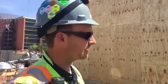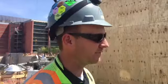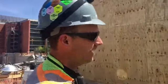And as long as it's bid into the project and we've talked to the rebar suppliers, it's an okay thing. So this is beautiful. So this afternoon we'll be able to take this, put it where it goes, when we need it, just in time, and then when the next just-in-time delivery comes, they'll come down here and drop the new trailer and take the empty one.